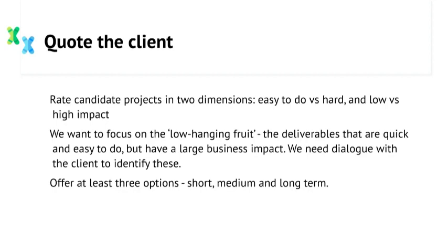So we'll offer at least 3 options and suggest different areas to focus on. Typically, candidate projects could be rated in 2 dimensions. Every deliverable could have either a high or low amount of technical effort needed, and it could be small or large in terms of the impact on the business. So everything is either easy or difficult and has a small or large impact.